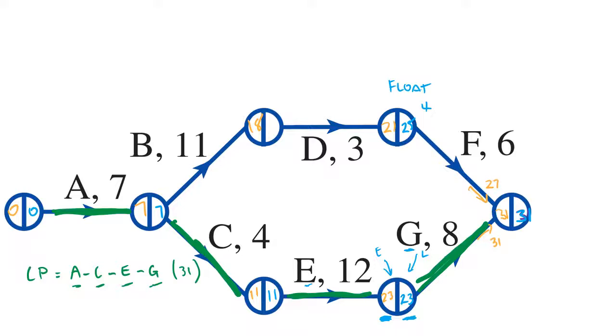So I can say 25 take 21 is 4, and so I can delay F by 4 minutes if I have kept up to speed with the other two activities here, both B and D. Let's continue. So 25 take 3 is 22. Now this one's already completed because activity A is on the critical path.